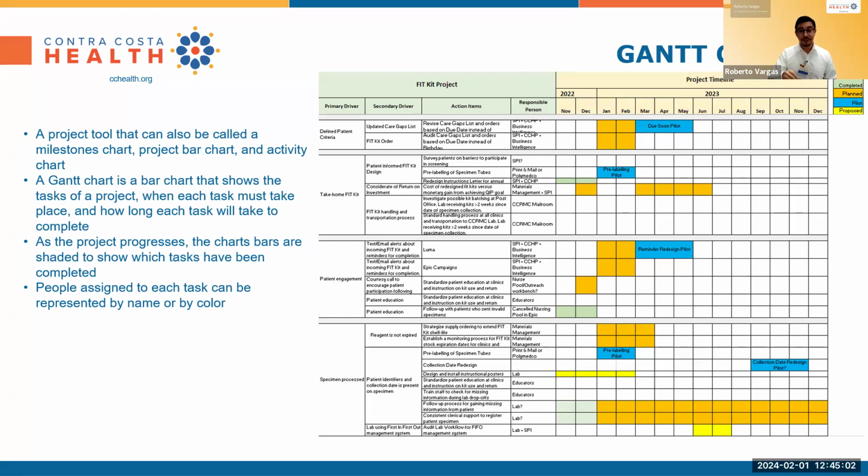And in addition to that, you may have a number of competing demands, a number of activities that need to get done. By putting it on a visual document, you will be able to identify for your team, whoa, we're actually doing 5 things at the same exact time. Do we even have the resources to get this done? And there might be consideration of, well, let's reorganize this, right? Let's reprioritize what needs to get done, and does it make sense to get it done in that order, right?